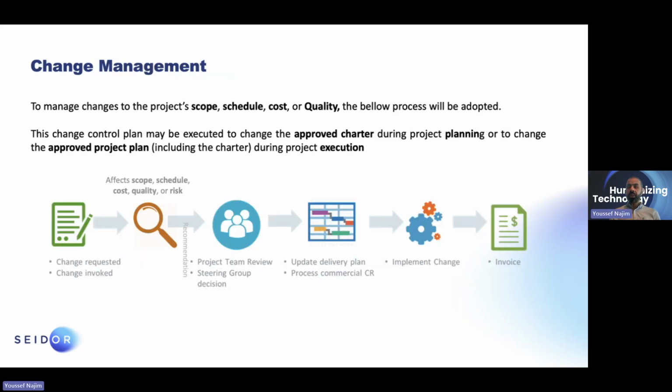In terms of change management, we know that sometimes things change. The project might take 3 to 4 months. Sometimes it might take 6 months, depending on what you want to implement. And we know that organizations are rapidly evolving. So if there is any change during the project, we're quite flexible, and we have a very clear change management process where we define it with you, and then we get the right approval from the project sponsor, and we clearly define for you exactly any change request, what is included in it, what the objective of it is, what the purpose is, and so on.